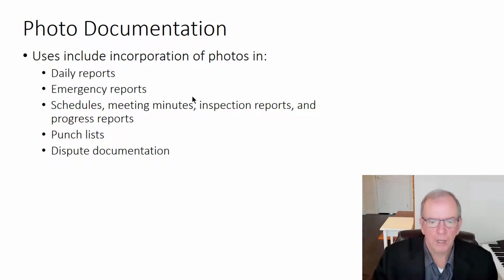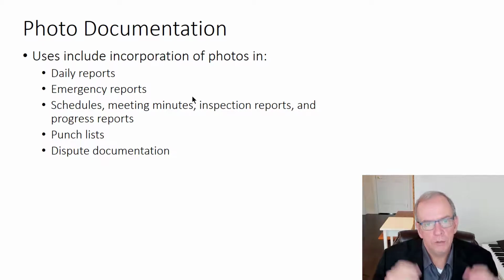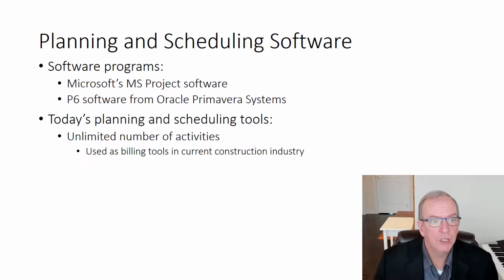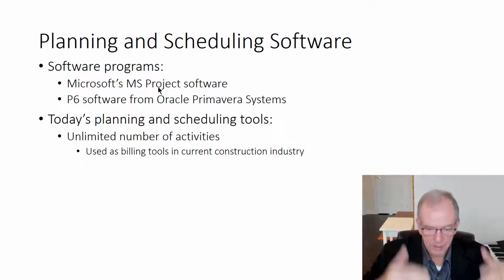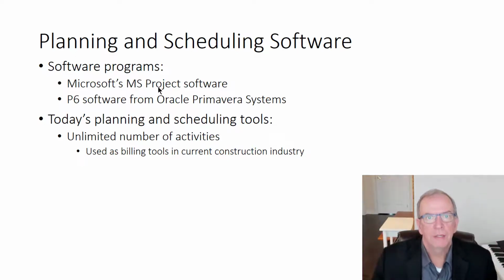Snap, click up, and it's date stamped, and so you know that that picture was taken on this date, and so that can be very helpful for documenting and tying together information like that's in a scheduling software. When you're saying that the bridge abutment on the east side was completed on September 21st, 2021, you got a picture of it, and there it is. It's complete, and it's time-stamped, that date.